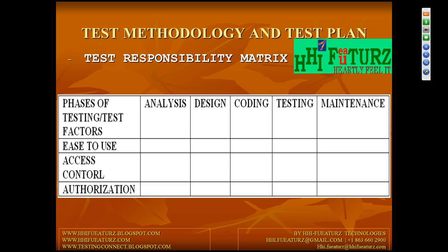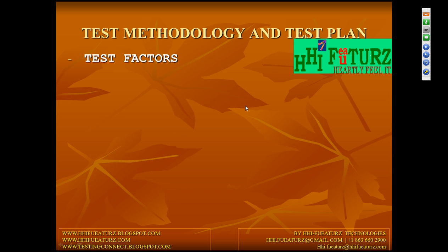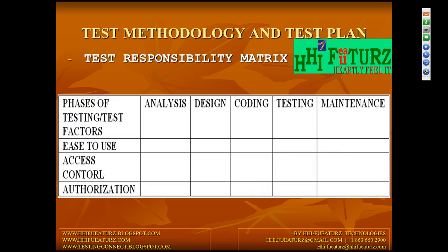The traceability matrix is a mapping between test cases and requirements. Horizontally we come up with requirement 1, requirement 2, requirement 3, requirement 4, requirement 5. How many requirements are there? Compose mail, inbox, outbox, send mail, drafts, trash, like that. All requirements you list horizontally, and vertically the UI test cases, functionality test cases, performance test cases, and security test cases.